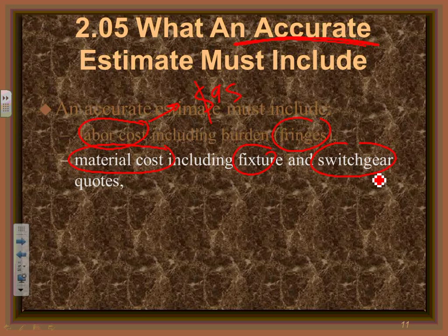They're very expensive, so you need to make sure you get a good deal on the price of very expensive equipment. Same thing for fixtures. Fixtures, you can have a $100 fixture, guys, or a $1,000 fixture to put it installed in location. So which one are you going to choose? So you have a quotation for these. After you get your cost for the labor and material, gentlemen, you have to put sales tax. In Minnesota, you have to do a sales tax on that.